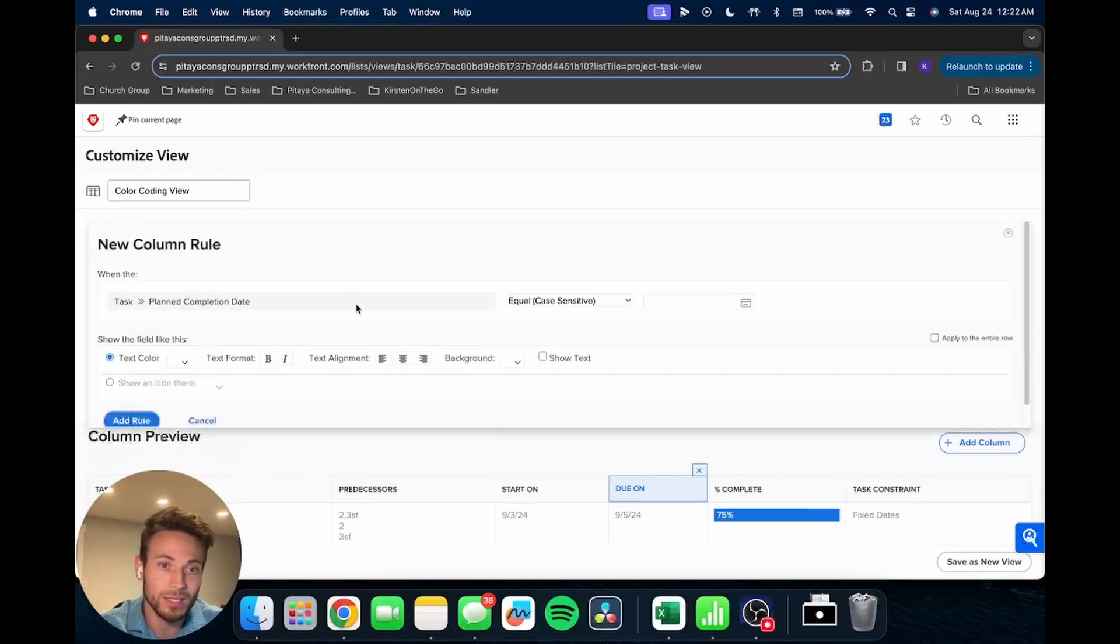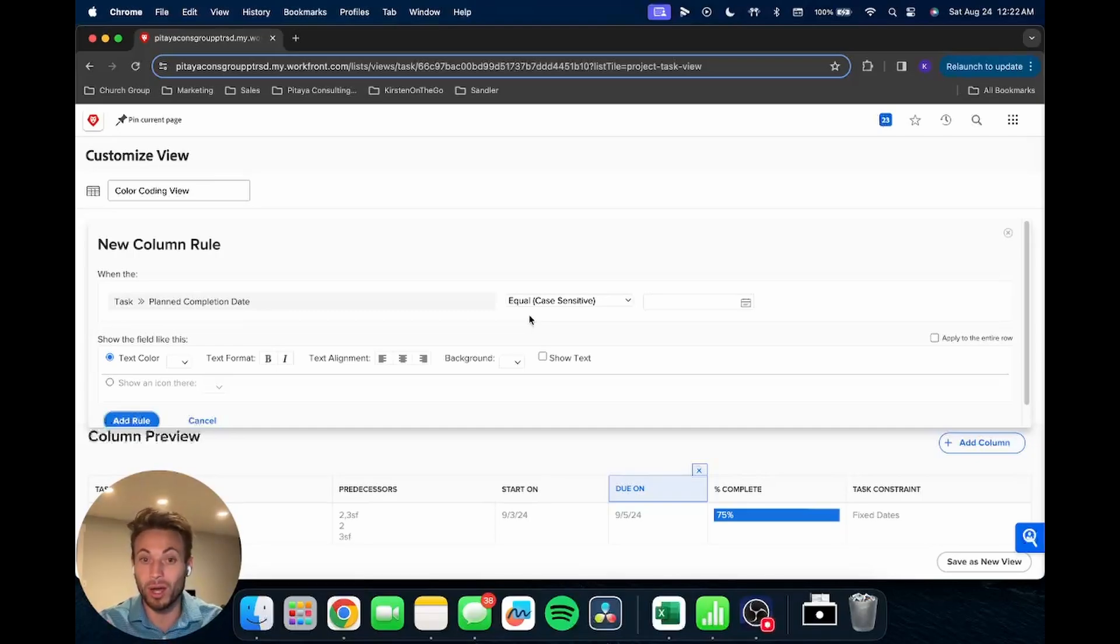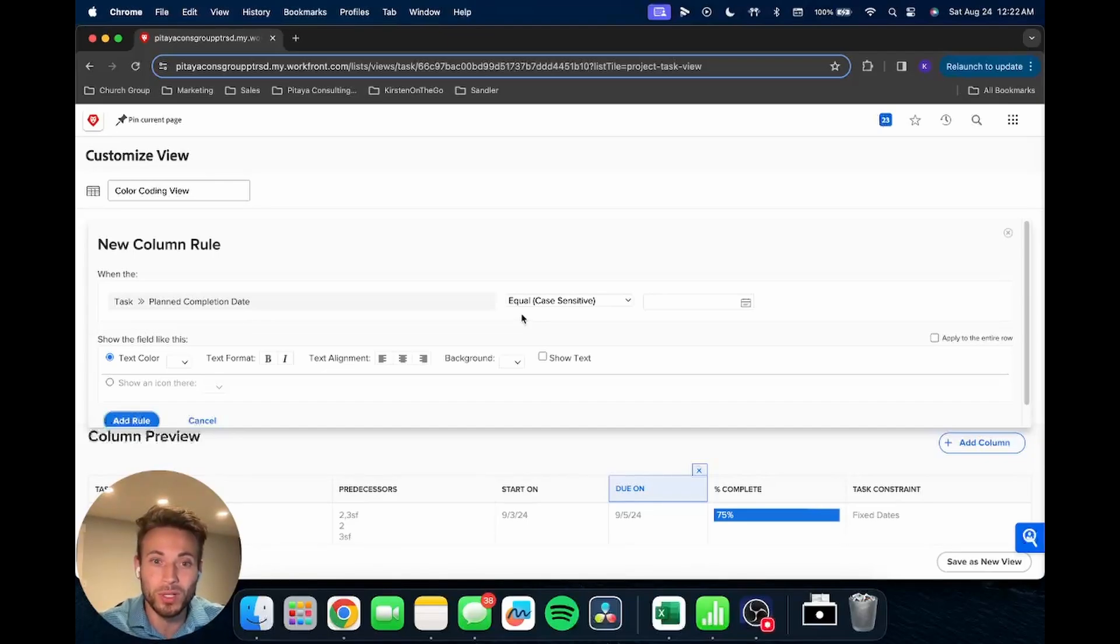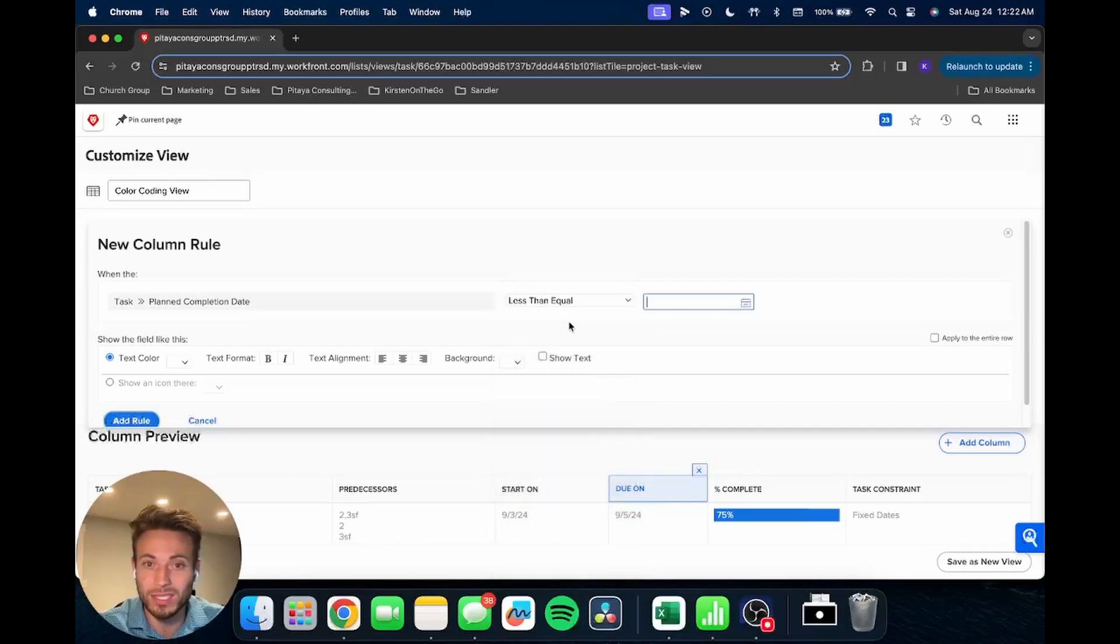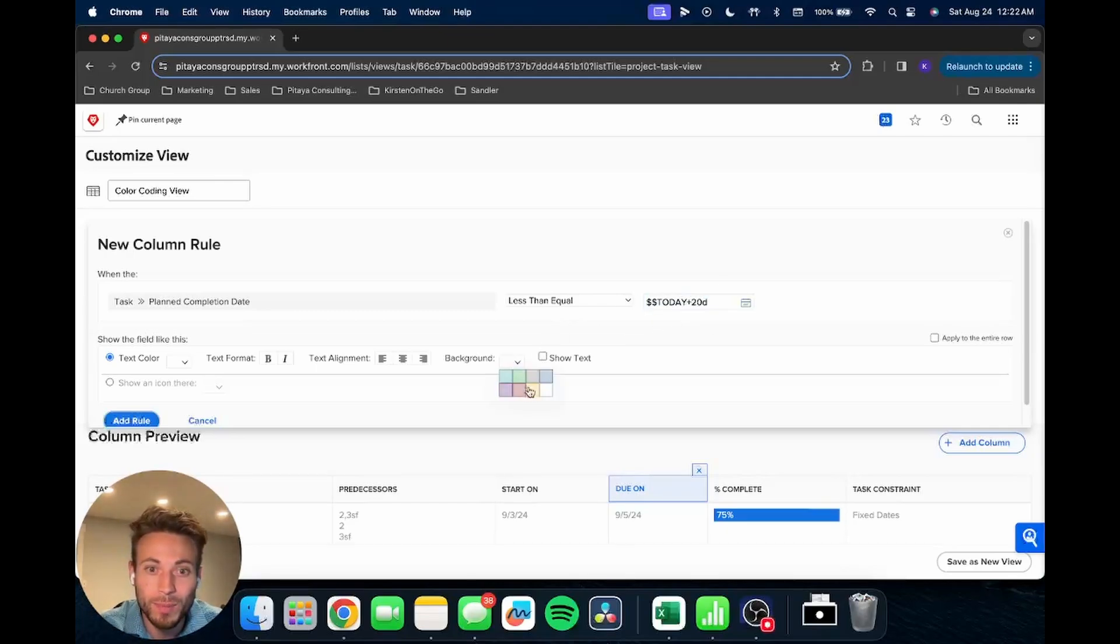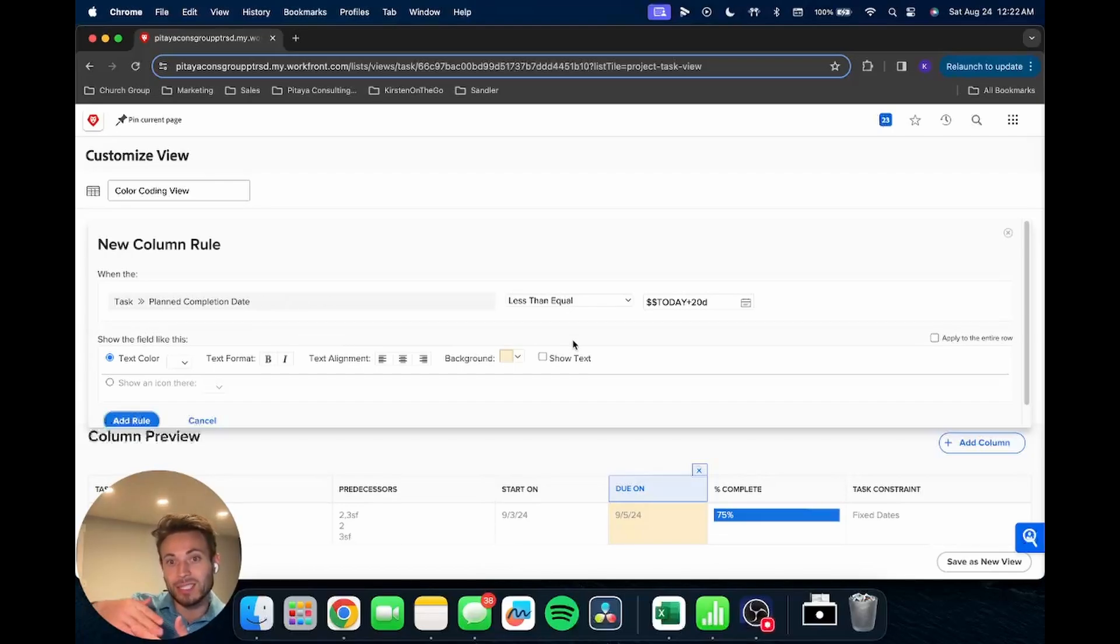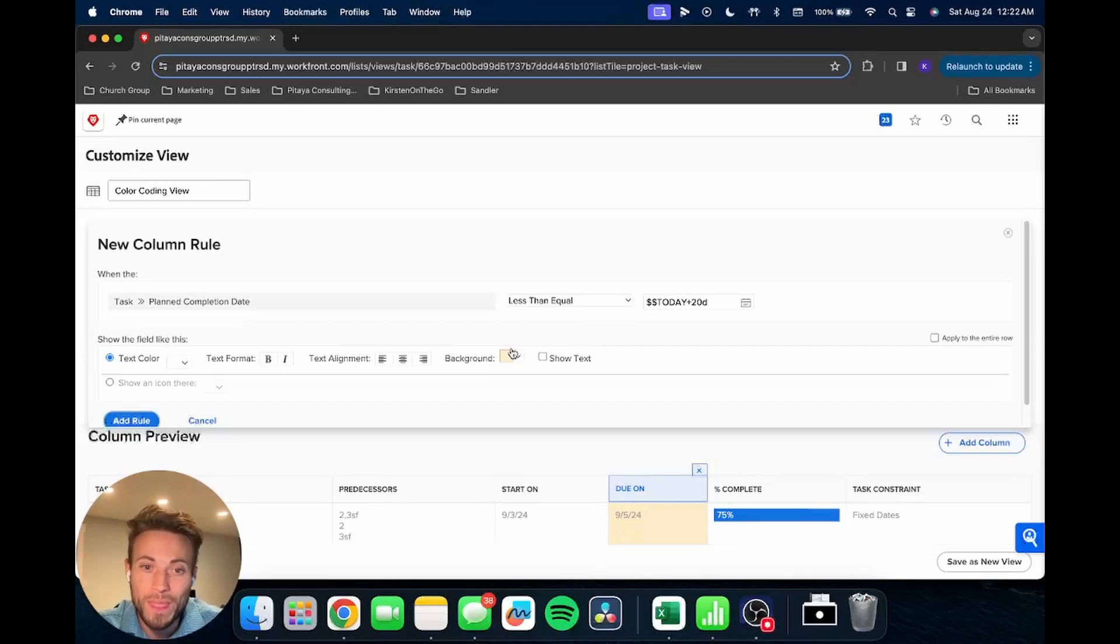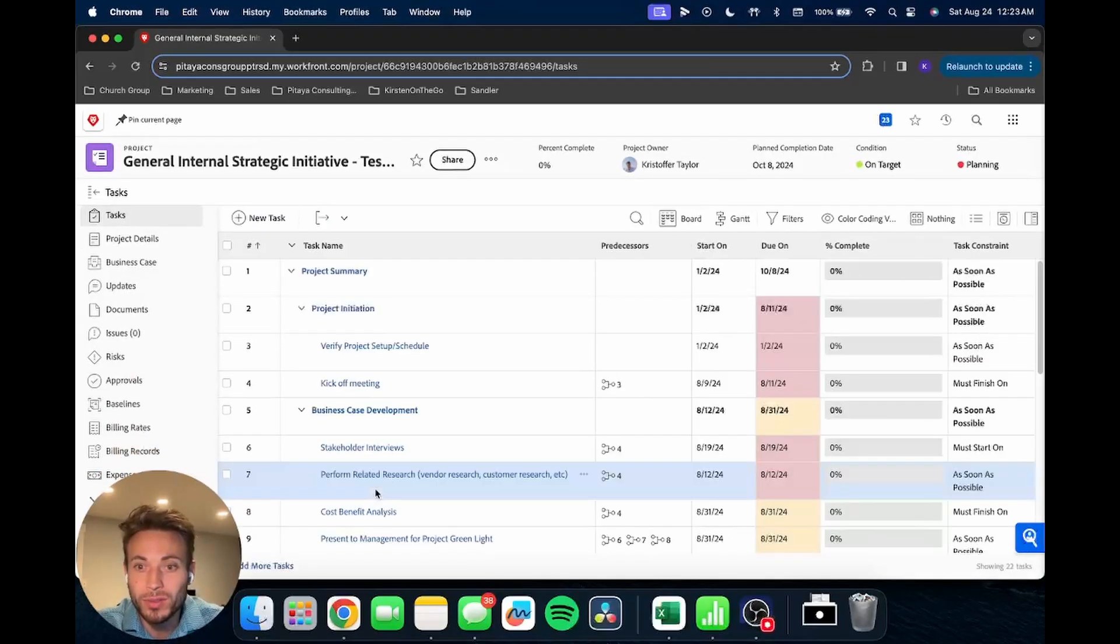Now let's say, let's assume we are also wanting to kind of get a heads up if we have a task that's not late yet. But let's say it's due in the next month, and we want to know, hey, it's due. So we're going to set up a rule for that. And we're going to say less than or equal to, and we're going to say today plus 20 days or one month. And let's make this yellow. So again, if the task is due within less than today plus 20 days, basically a month from today, moving backwards, it's going to show up as yellow. So let's just see, make sure everything's looking how we want it to.